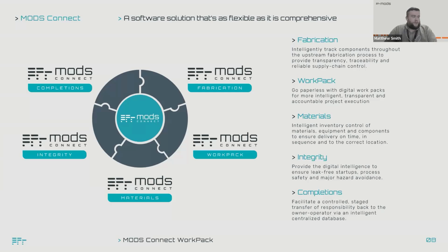So we can issue either for transportation, which could go on either a consignment note for road transport, or manifesting, which is sea or air, in MODS Connect, which will allow you to get those materials to the destination. So if it's an offshore platform, of course, it may go on a consignment to get on a manifest, but then it'll arrive offshore on the platform.